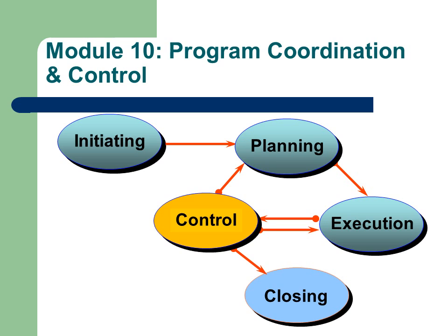Whilst the project manager has ultimate responsibility for the way the project is run and the outcomes it achieves, it is up to the project coordinator to ensure that the task is made easier, usually through assisting with the monitoring and control of the project. A project coordinator role may be across all aspects of the project, or it may be focused on one or more specific aspects such as scheduling, financials, or quality. As with any project role, the project coordinator must ensure that the role is clearly defined and agreed with the project manager before commencing the project work.